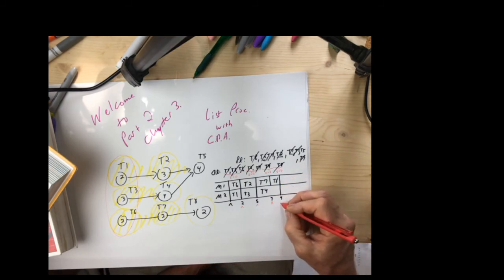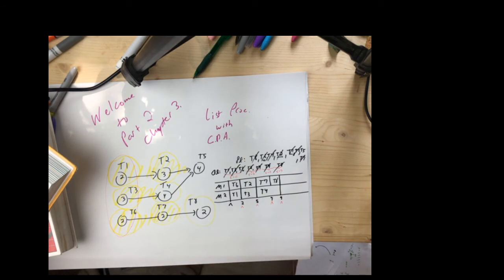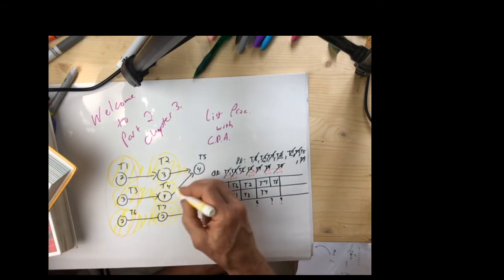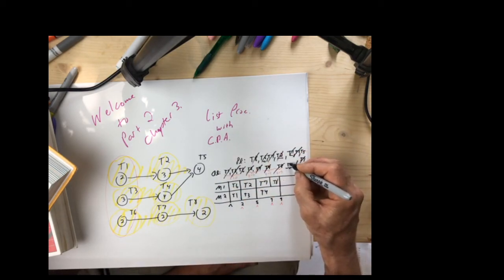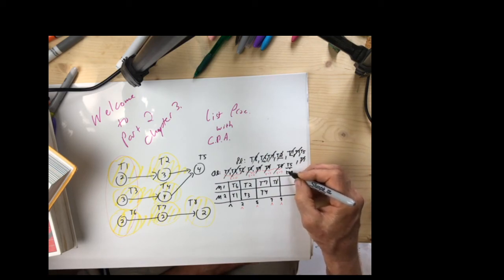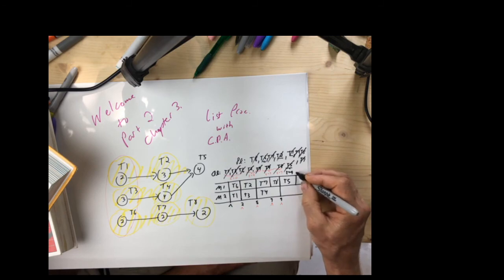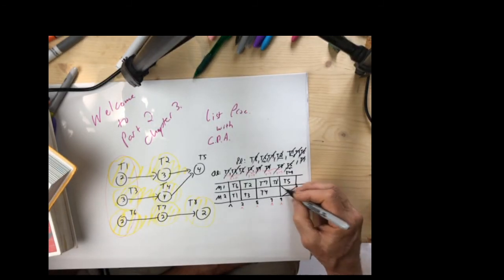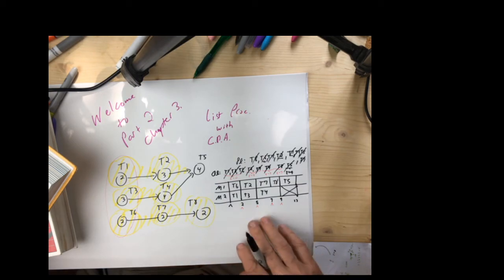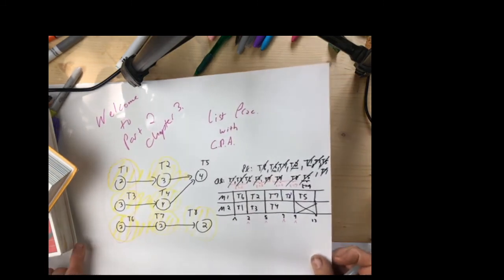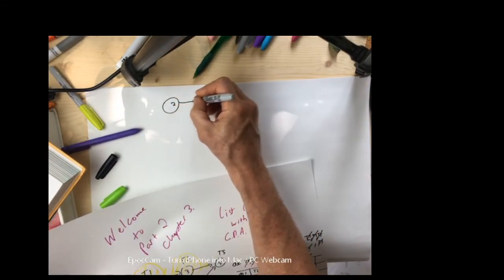Now when we move time forward to t equals 9, T8 finishes, T4 finishes, and just like that, T5 is the only available job at time equals 9. You plug it in, it runs for 4 out to 13, and there's downtime. And so there's our schedule. Not bad. Is it good? Could it have been done better? Well, we're going to try a different approach to this. We're not going to write down just any old priority list.